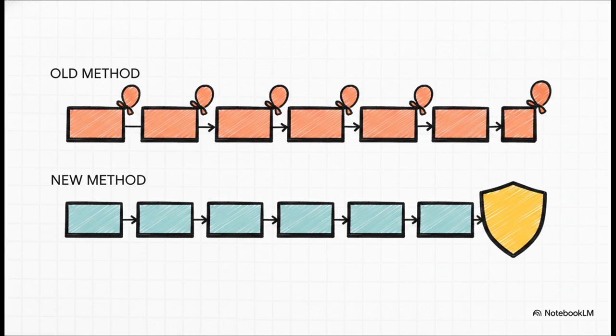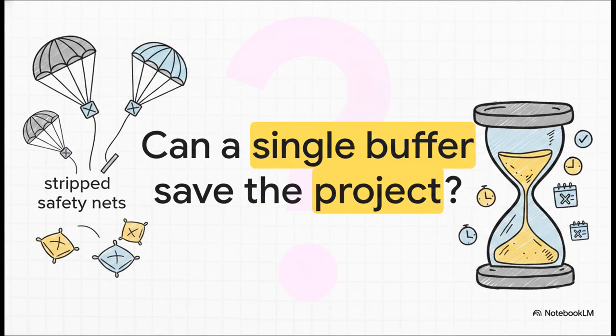Well, the critical chain method, or CCPM, proposes a totally radical alternative. It completely strips away all those embedded safety margins from the individual tasks. Instead, it pools all that rescued time together and creates one single, transparent, shared project buffer at the very end of the schedule. That means if one task goes a little long, it just eats into the shared buffer, not the final deadline. This keeps the whole team laser-focused on the actual finish line rather than hiding behind their own individual task padding.